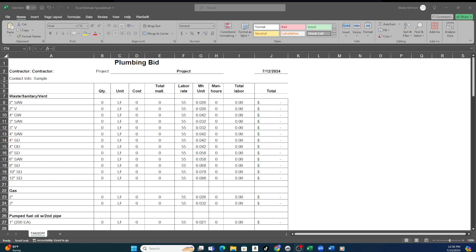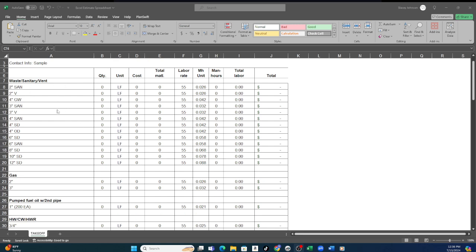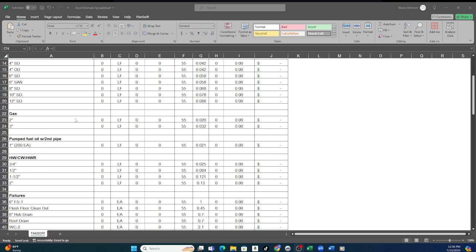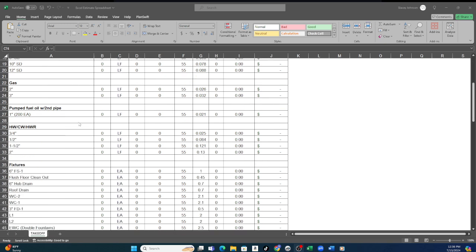What we see here is a generic example of the spreadsheet where the top portion we have all of our waste sanitary vent pipe, our gas pipe, and then all of our water pipe. But the newer version shows the difference between our horizontal measures of pipe and the vertical measures because the pricing and the man hour totals are different.